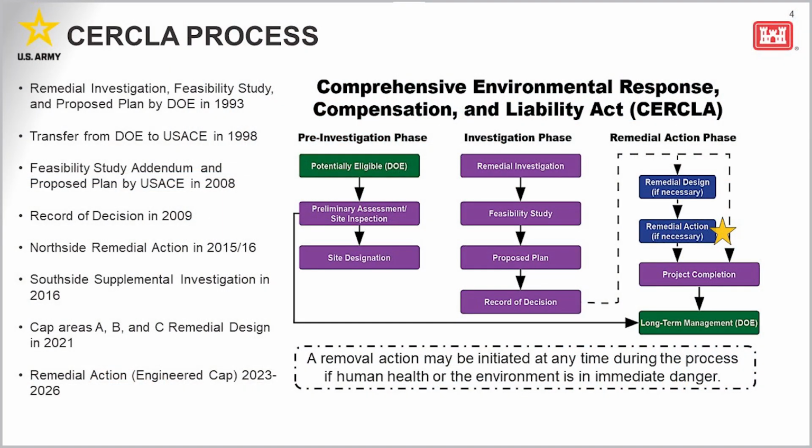You can see there's a lot of sequential steps in the CERCLA process. Also, we included some dates on this graphic to show when we conducted each step on the Seaway FUSRAP project. Actions at the site were started by the U.S. Department of Energy back in 1993. Through 1998, the DOE completed an investigation, a feasibility study, and proposed plan in 1993, a long time ago, 30 years ago now. However, they paused work due to community concerns over the proposed remedy at the time, which was